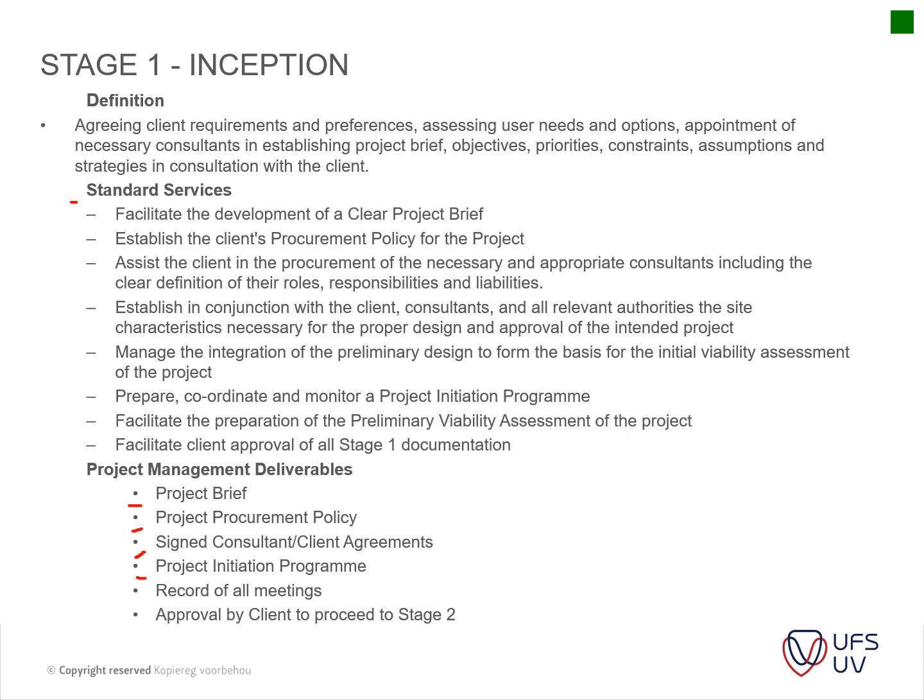And then record all your meetings. Very important. Approval by the client. This might seem as a given, but many times you don't have signed documents that you can proceed on, that they have accepted the documentation that was provided to them, and suddenly they make changes, but this is not what we wanted. We wanted a smaller building, for instance, and so on. Okay, so it's good to have a document that's signed off to proceed to stage 2.